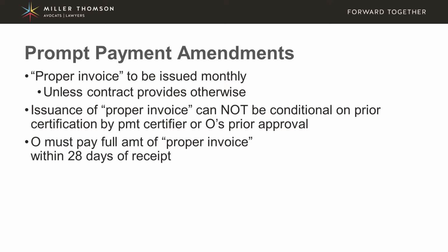Another important factor to remember is that the issuance of a proper invoice cannot be made conditional on prior certification by a payment certifier or owner's prior approval. Now, the reason I mention this is because once that proper invoice has been issued, it creates some serious obligations for an owner.